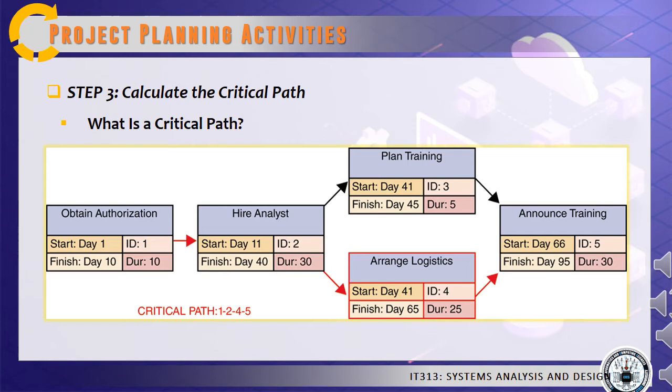For example, suppose that you invite Joanne and Jim to your home for dinner. Joanne arrives on time, but Jim arrives 30 minutes late. Jim's arrival is part of the critical path because you do not want to start without him. So the meal will be served 30 minutes later than originally planned.